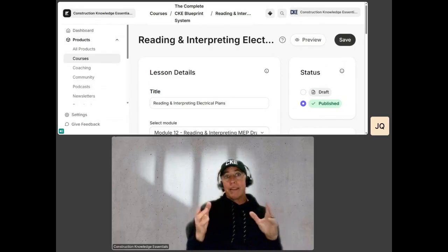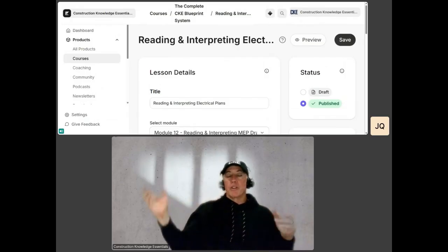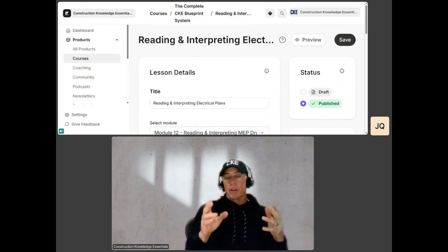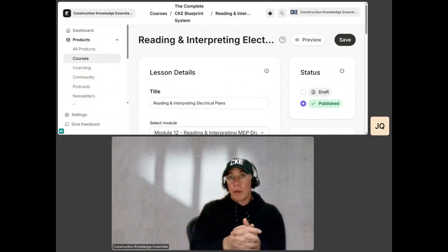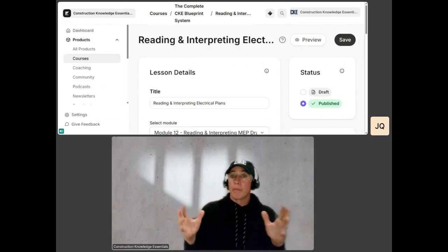have either one in there, but I'll take plumbing just because they make a bigger mess. Well, depends on who you ask. Plumbing goes in, lays all their copper, gets it all done. Electrician comes in behind them, does their electric. So you'd say, hey, plumber, now if I was to build the schedule, I would say to the plumber, I already know the plumber's going to take maybe 2-3 days at most. He wants to get in and out of there, depending on the size of the shower.